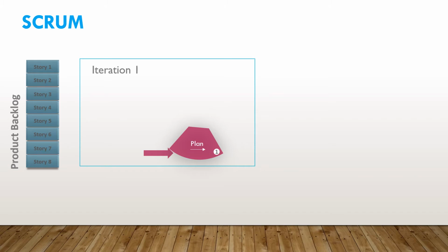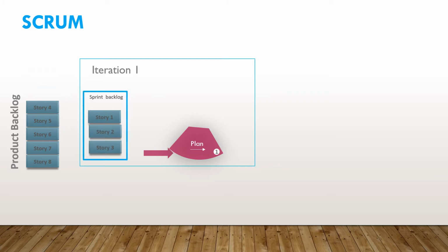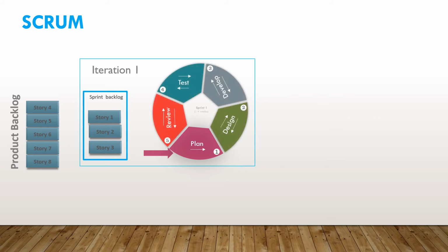On the basis of the estimation of efforts and the priorities that the product owner has given, the development team selects the requirements for the sprint, and then the sprint backlog emerges. And then the development team continues with the rest of the development activities. Progress is captured via the so-called burn-down chart and different ceremonies that Scrum provides.